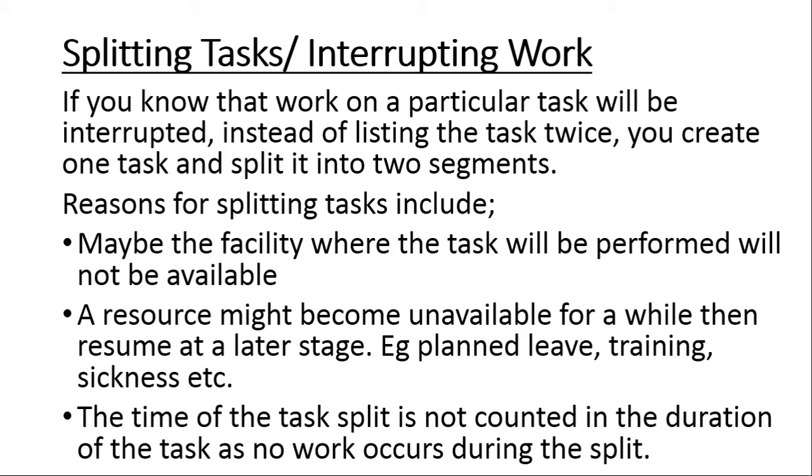The time of the split is not counted in the duration of the task because no work is going to be happening during the split. So if we have got an activity that has got a duration of 3 days and we split it into two segments of 2 days and 1 day, then in between we have got a gap of say 5 days.